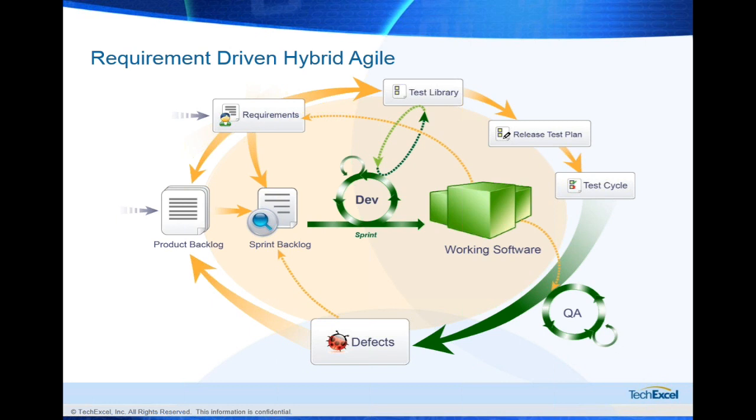So you have like a child subtask, the QA testing, whose purpose is to make sure related test cases are created and finalized, and also tested to a certain degree, so that quality can indeed be claimed to be a built-in process of your agile development without losing the agile nature of your agile practice.